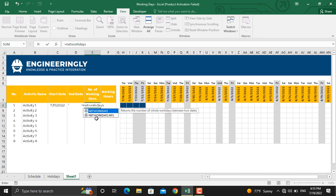In the NETWORKDAYS, you can only exclude the holidays from your project schedule, while in the NETWORKDAYS.INTL, you can exclude the holidays plus the weekends. So I'll use the NETWORKDAYS.INTL function.